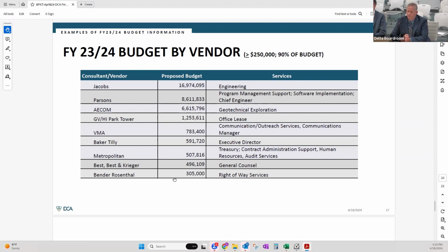So when you use the terminology, go out for bid, are we talking about construction? Or are we talking about proposals for professional services? So I'm from a procurement environment. We tend to use a very generic statement. Go out for bid means basically, in my mind, I'm trying to get you the best value. So if it's construction, it'll be the lowest responsible bidder. And then when it's for professional services, it's qualitative. So you try to get the best consulting firm to assist you. Different criteria on that one.